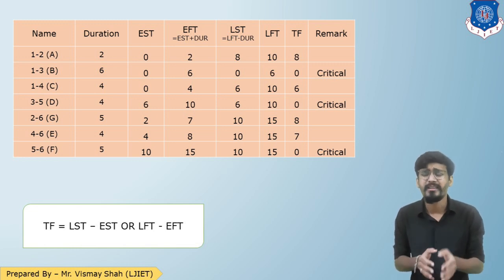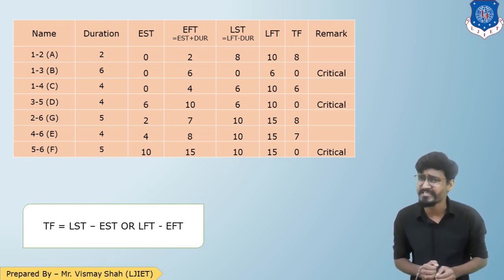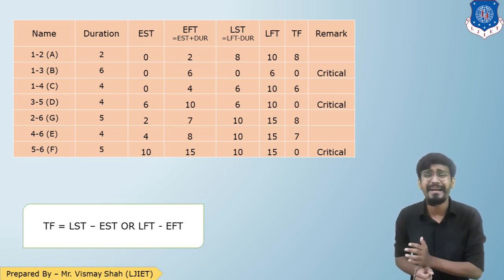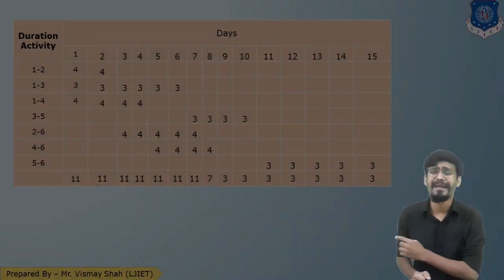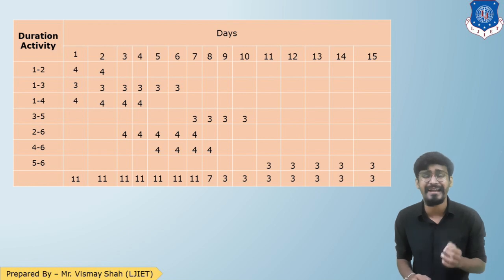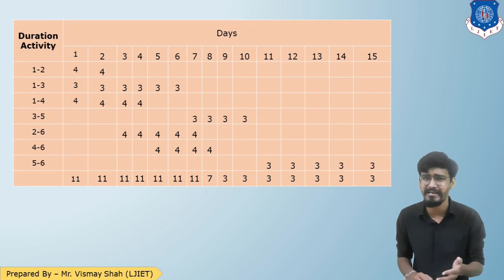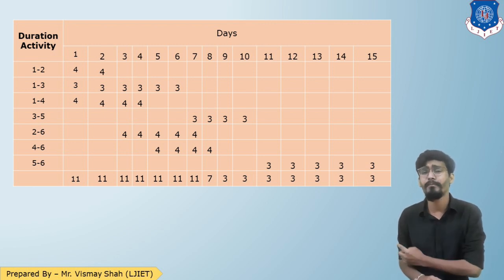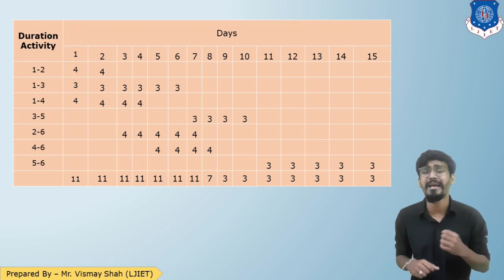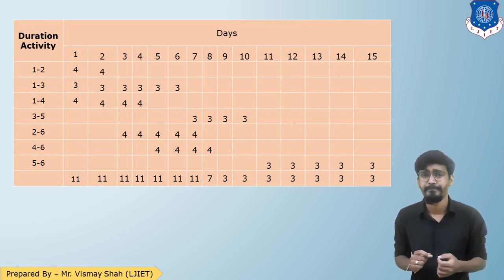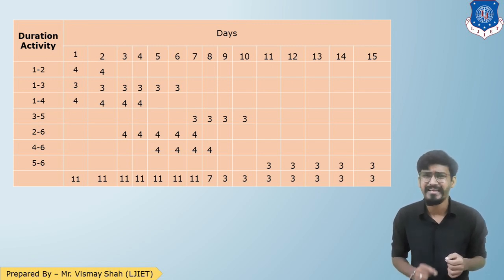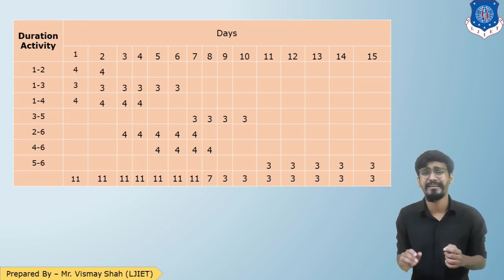Since we know the total duration of the project is 15 days, let us prepare a day-by-day chart of the mason requirement. Here is the day-by-day table: activity 1-2 requires 4 masons, activity 1-3 requires 3 masons, and so on. Below each day, there is a total mason requirement for the particular day of the project.